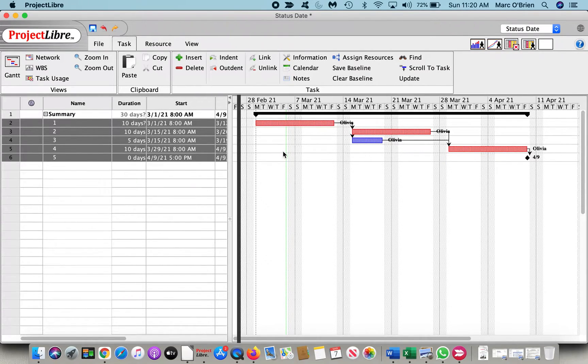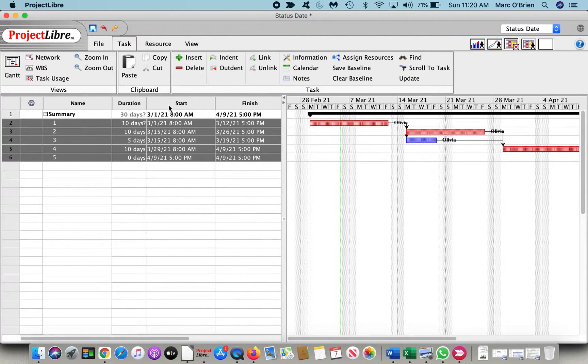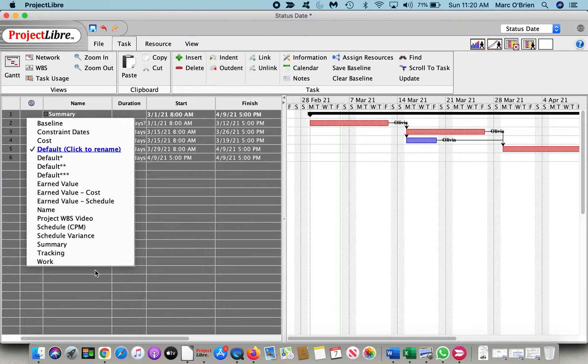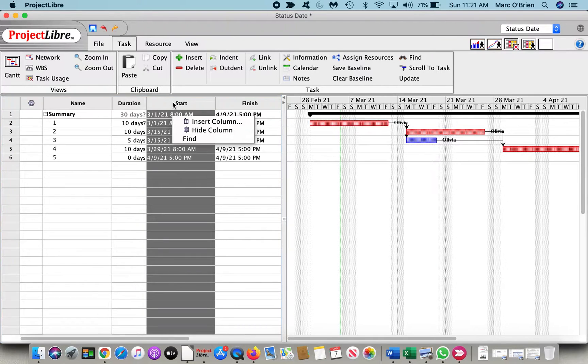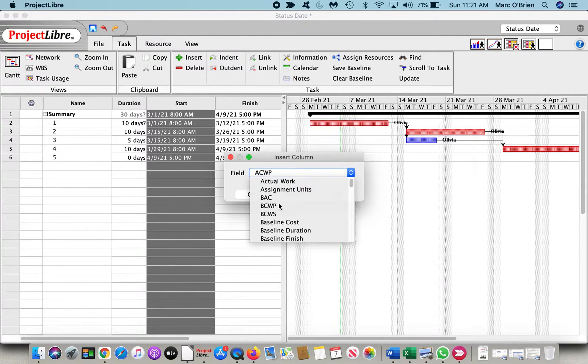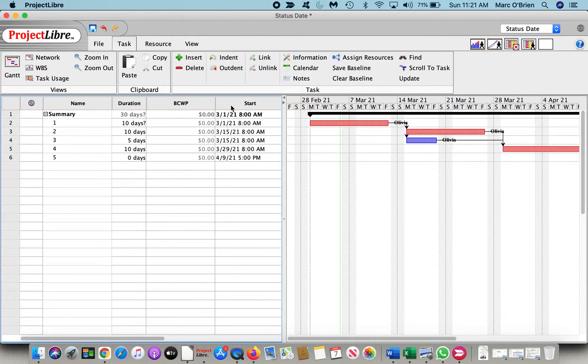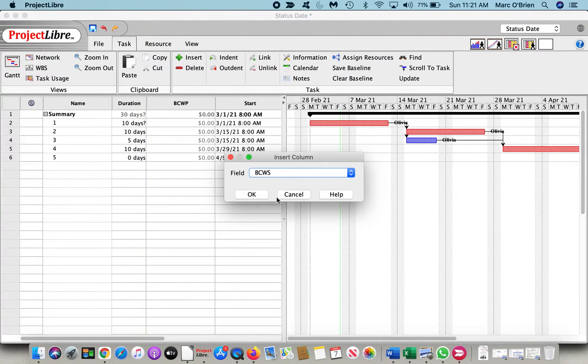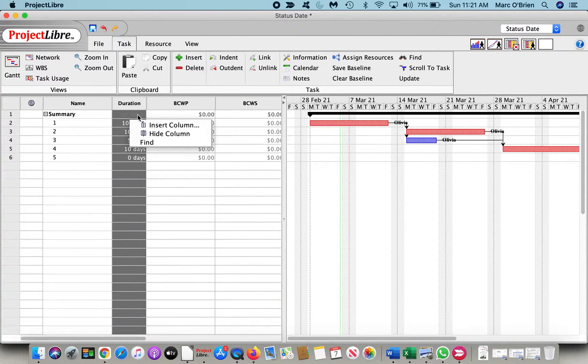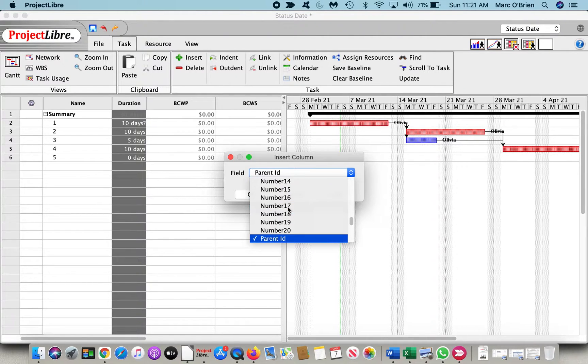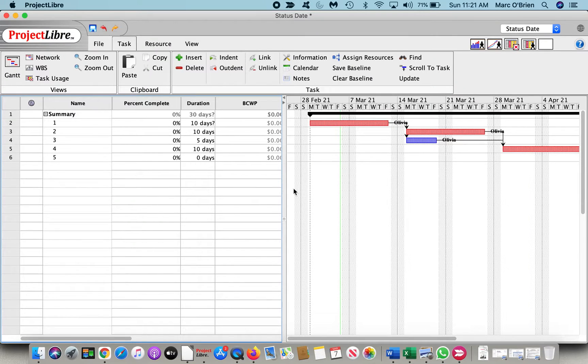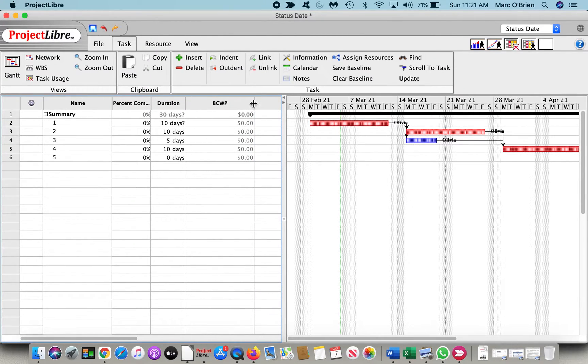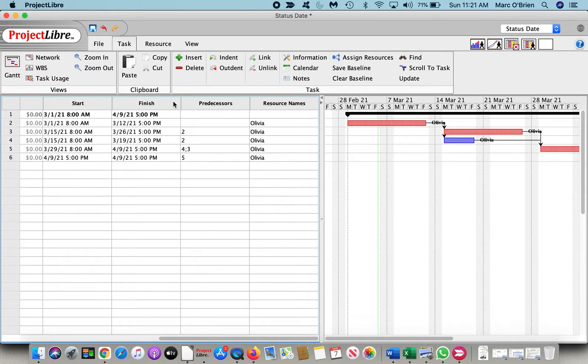One thing I want to do is add some columns in my spreadsheet for tracking this. There is a tracking Gantt chart, which you can actually come through, and these are all the different spreadsheet formats that are set there. There's earned value cost and schedule, etc. I'm going to use the standard one. Right-click and say insert a column, and I'm going to insert the budgeted cost of work performed. Insert column again, and do budgeted cost of work scheduled, and then here I'm going to once again insert a column. Some of the defaults will have this already. I'll hit P to go down, and I'll do percent complete here so that we can see these different things. I can resize this so it all fits in better, and now we are set.